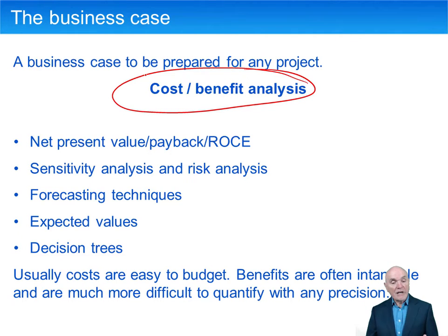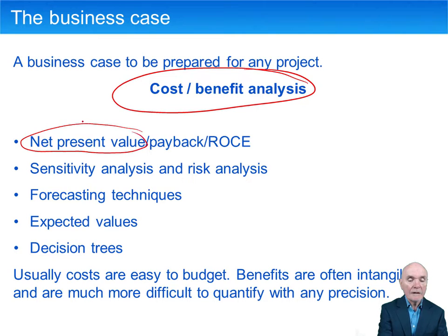Like any project, and you remember from F9 when we were looking at the net present values, questions were often using the word project. A company is thinking of a project where they're going to put up a new factory, etc., etc. And really, by far, the best way of dealing with a business case is to do a net present value. This takes into account the time value of money. Of course, we're making estimates and that.